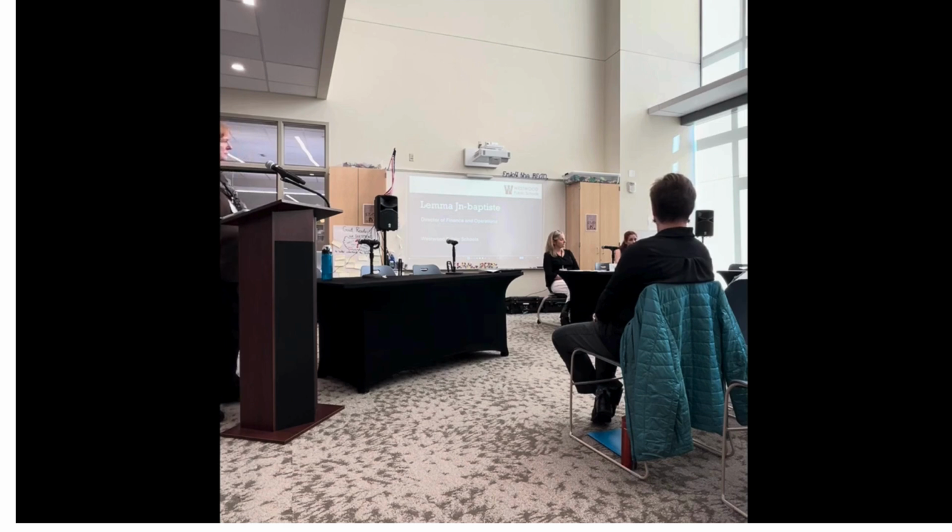But it was a close call. There was one Friday where we were all hanging on a thread. We knew Friday at 1 o'clock we had to make the decision about whether this building would open on time or whether we had to delay until an April vacation opening date. And the superintendent decided to go for it, without complete information at that moment in time. But there was a lot of teamwork there, and Kim sitting right next to me at Eversource was a key part of this process as well.